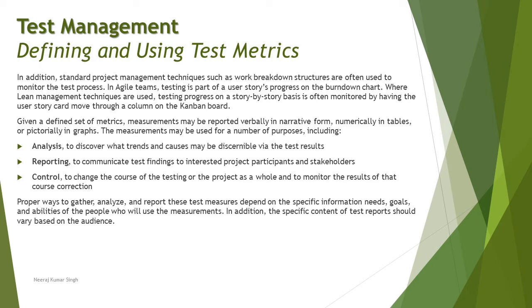In agile teams, testing is a part of user stories progress and shown on the burndown chart. Burndown charts graphically represent the number of tasks remaining at any point of time within a particular sprint. Imagine you have taken 10 tasks in a sprint — each day you generate a burndown chart to see tasks remaining, estimating how much more needs to be done and whether you are following the estimated path.